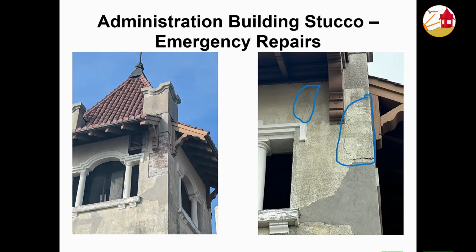It sounded hollow. It sounded like the scope of this might expand beyond what we had anticipated, which was 3 days of work to remove the loose stucco and reapply. As it turned out, when we realized what we were hearing, and you can see it right here, you see the wood framing? So all of this was still very solid. This was a bad patch. There was a hole actually right here above that molding.